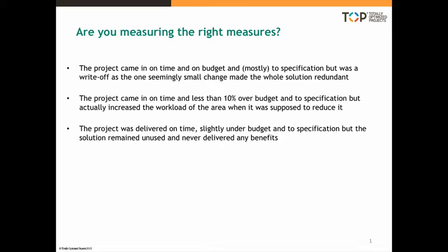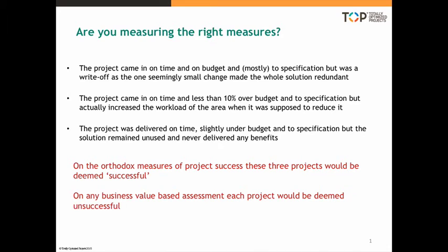Third one, the project was delivered on time, slightly under budget and to specification, but the solution remained unused and never delivered any benefits. Now, the interesting thing about these three examples is that from an orthodox project success measurement point of view, they would be deemed successful. But from a business value assessment, each project would be deemed unsuccessful. One solution was redundant, one actually increased costs, and one was never used. No business value whatsoever. So if we're measuring projects the way we do in most cases, then Houston, we have a problem.